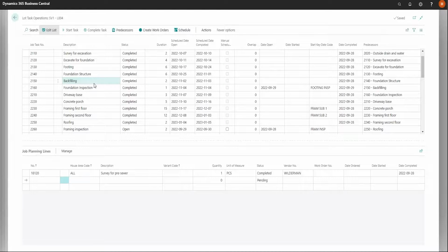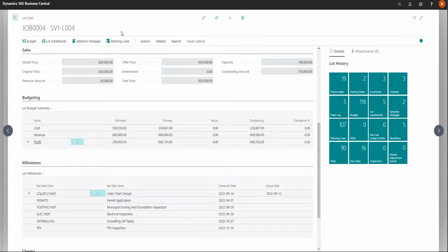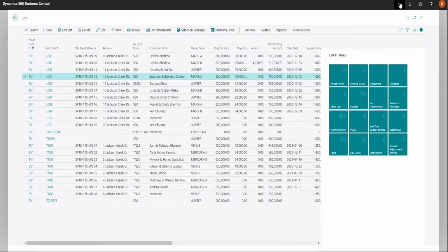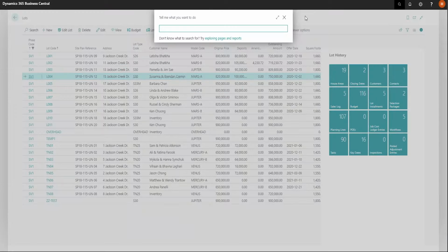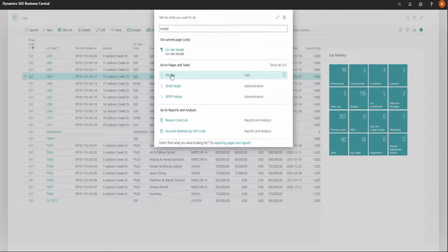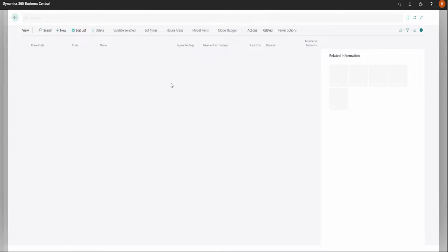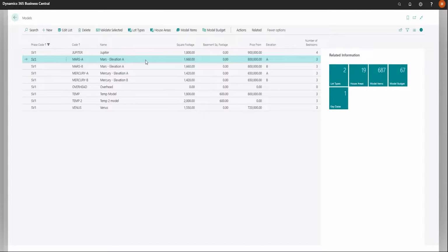In order to get there, there are three different approaches, and we recommend you take one or at most two. I'm going to show you three different approaches today, and then you can decide which works for you and take it from there. We're going to start in the models, and this is the simplest option here. You would only typically take the option to only enter key dates at the model level if you had no intention of using the site super to do any tracking of the system, or if you just wanted one individual task which was done completely outside of any other tasks.